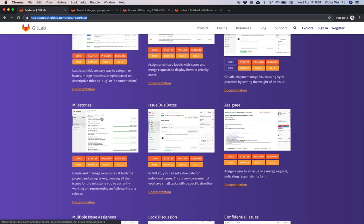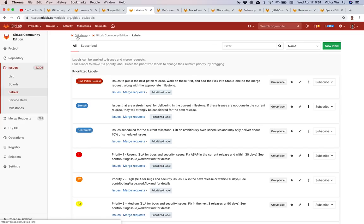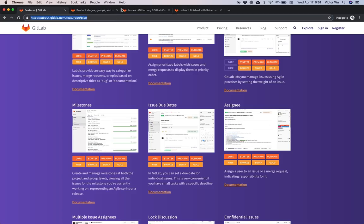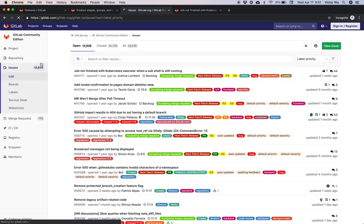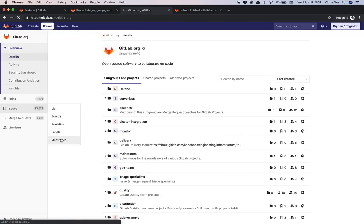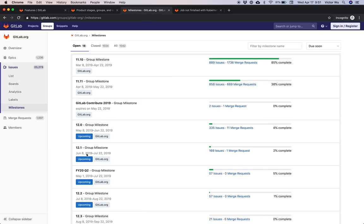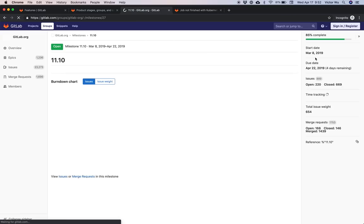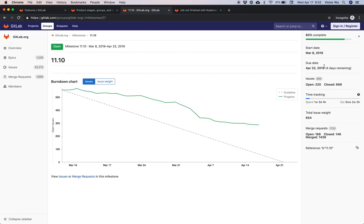Milestones work in a variety of ways — they can work like agile sprints or as a point in time. At GitLab we use milestones to represent both a sprint and a release. Any milestone has both a start date and an end date, such as March 8th to April 22nd. If you only have a due date, you can use a milestone to represent a release on a particular date.